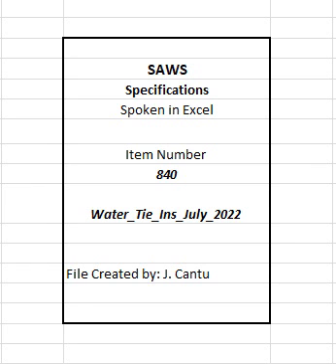5. Removal and handling of asbestos cement pipe required for tie-ins will be processed as a separate pay item in accordance with SAWS specification item number 3000. 6. Materials paid on site will be in accordance with Table 1 of specification item number 100 mobilization.